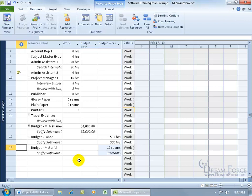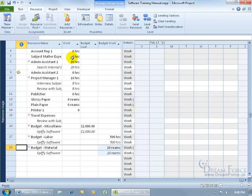Now that we have our budget fields set — cost $2,000, budget for work 500 hours, budget for materials 10 reams — we can compare those against the work field. The work field is already set up. As we move through the project and start entering actuals, for example, we set aside 20 hours for the admin assistant, but when that person actually works the task, let's say it takes 25.